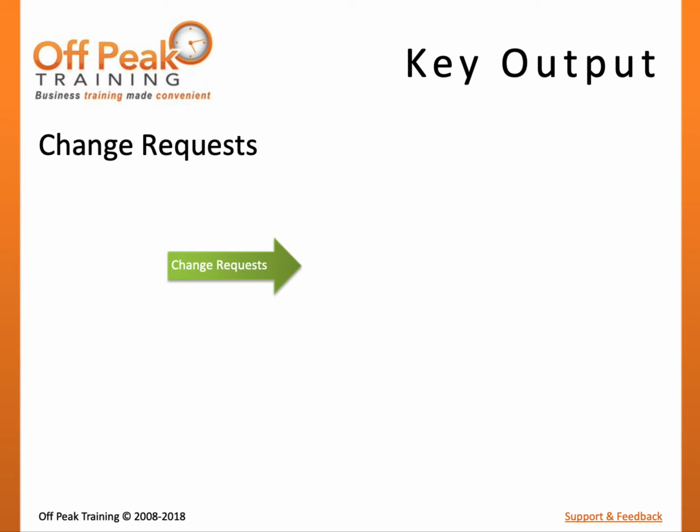Periodically, changes must be made to redistribute, reassign, or replace project resources. Since this can have an effect on the project schedule and budget, change requests can be issued as an output of the Manage Team process.